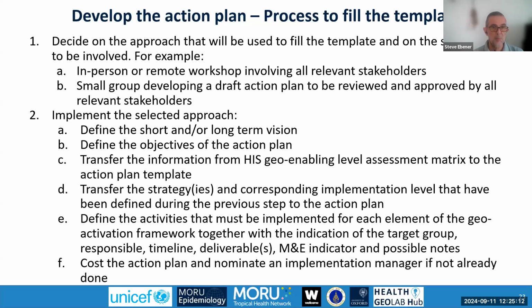Based on this, you can develop specific objectives, and then you will transfer the information that comes from the assessment into the template. You will then also transfer the strategies that have been defined into the template, and then work at defining the activities that should be implemented for each of the elements of the framework to reach the stage that you had, the strategy and the final stage and the objective you have set for each of these elements in the framework.